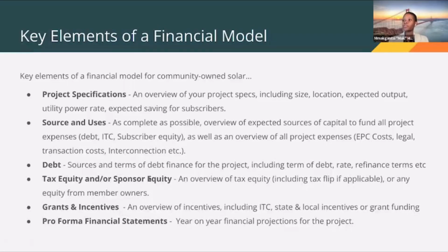And then some key outputs, or rather, sources and uses will be one of the other things that you'll be able to see in the dashboard of your financial model. You'll generally have, and you'll want this to be as complete as possible, this overview of what your expected sources of capital are for funding your project, and what the expenses will be. So things like your EPC costs and legal transaction fees and interconnection fees will all be there as complete as possible.